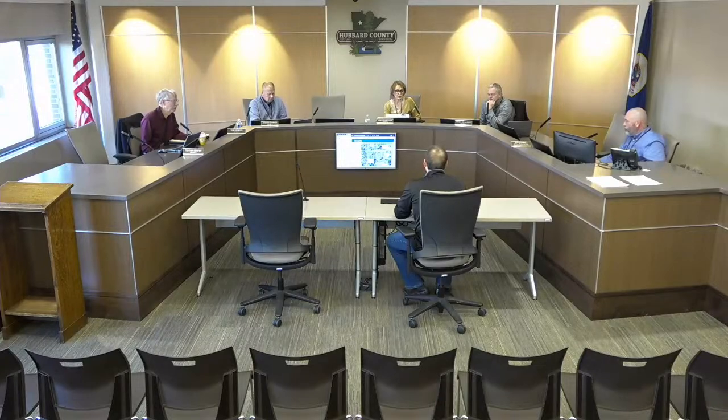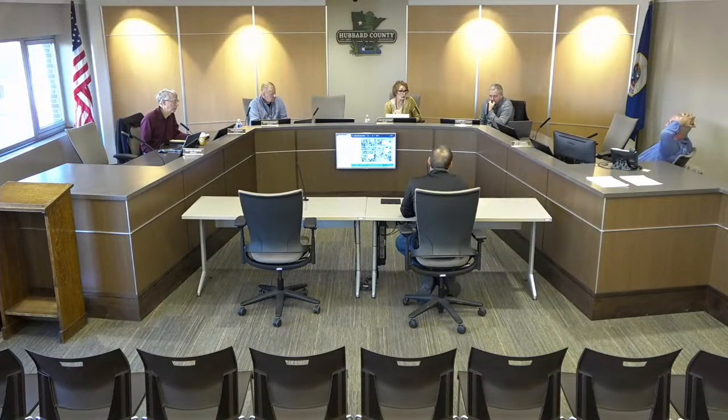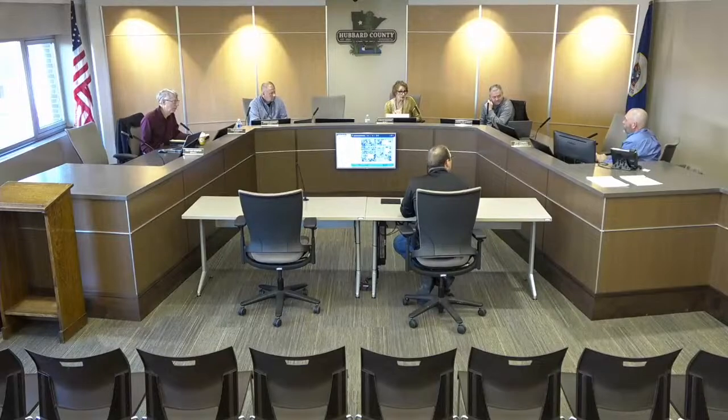At the beginning of the meeting, when you met because of the law library, you were trying to figure out if you should start on the 2nd floor or 1st floor. I'm assuming the staff thought the least amount of disruption for the busy building season was to start with the 2nd floor? Justin and his team identified the 2nd floor as the first place. If we have some material delays and we can get that space done, then that gives us even more flexibility when we go down to the 1st floor relative to the attorney's office.